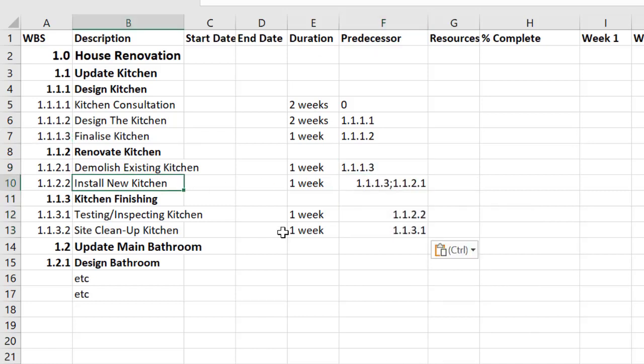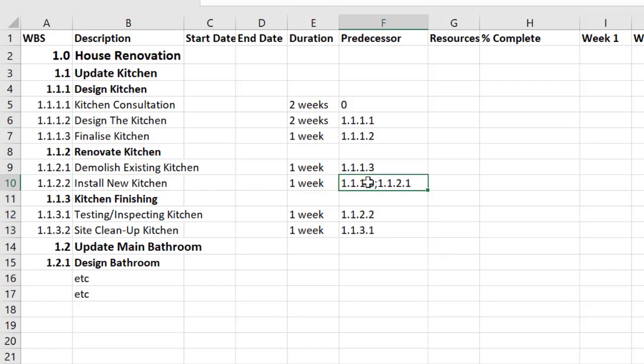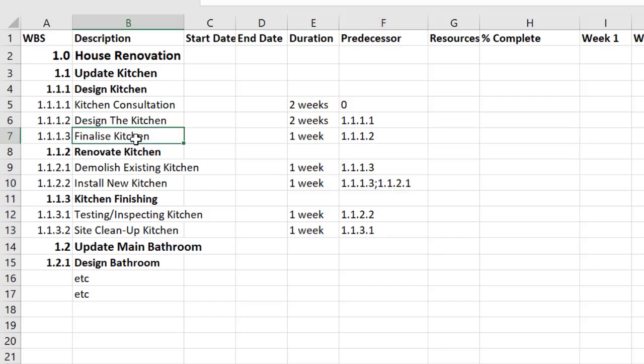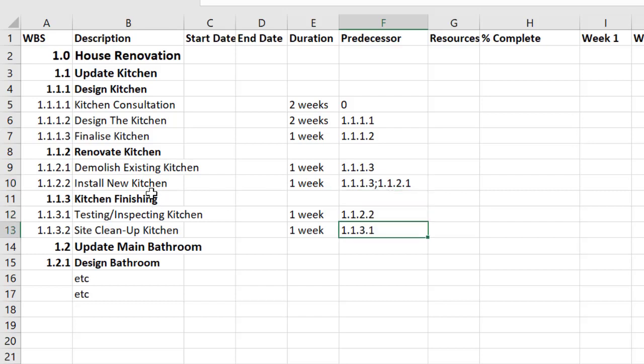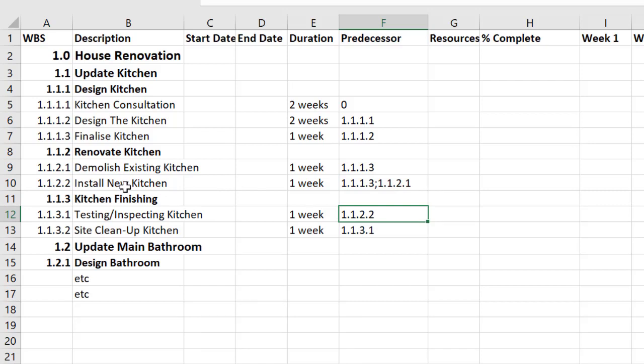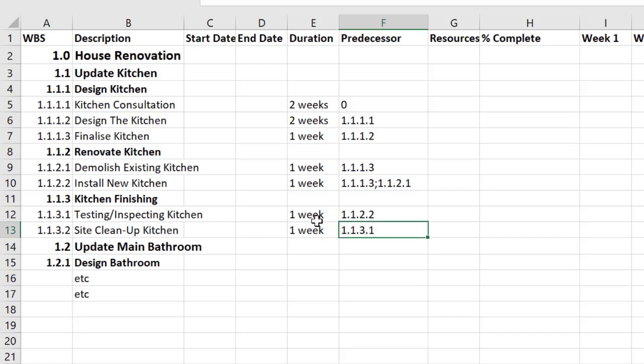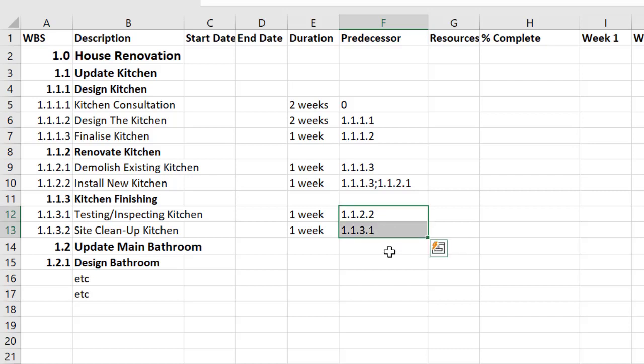Now for installing the new kitchen I actually have two dependencies here. So the first dependency is I can't install the new kitchen without having a finalized design that can be installed and I also can't install the new kitchen before I've demolished and removed the old one. It's impossible. So there's actually two predecessors to that activity. And these ones are fairly straightforward. I can't test and inspect until the install's finished and I can't do a clean up until all the testing, inspecting and fixing up's finished as well. Sometimes you'll decide that two things should be starting at the same time, have a start to start relationship or finishing at the same time, have a finish to finish relationship. But I've kept this very simple here.